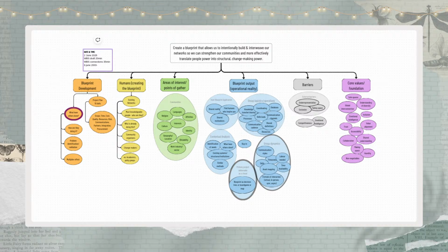So last time, part of what we're doing with the work breakdown structure is, as the name indicates, breaking down the work and trying to structure it in a way that makes sense. We want to go from the overall goal of this project, which is what we have at the very top of the structure, and break it down until eventually we get to task-level work.